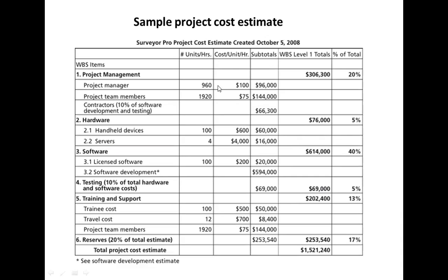So you can see units, hours, and cost, and then it's multiplied and taken as a total. Okay, so this is a sample. So when determining these unit hours, you may need to use those cost estimation techniques. You may look at previous costs in similar projects and then decide that.